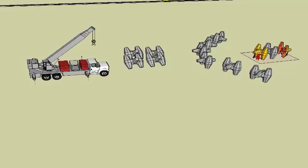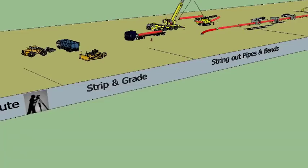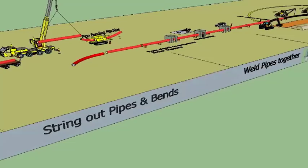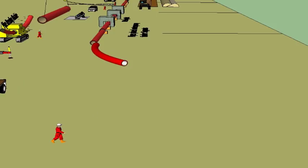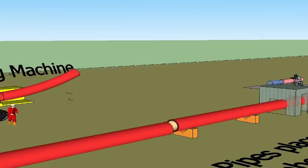Oil and gas pipelines, both onshore and offshore. Onshore pipeline construction sequence: set out the pipeline route, strip and grade the ground, string out the pipes and bends, weld the pipes together, excavate the trench, lower the pipe string into the trench, backfill the trench and reinstate the ground.